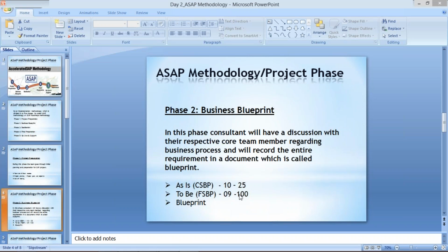So where are we going to note it down? So we prepare a final document where we are going to list down all the deliverables in detail, and apart from this, whatever other requirements the client has. That document is called the blueprint document. So guys, blueprint is a final document where we are going to mention all the deliverables.